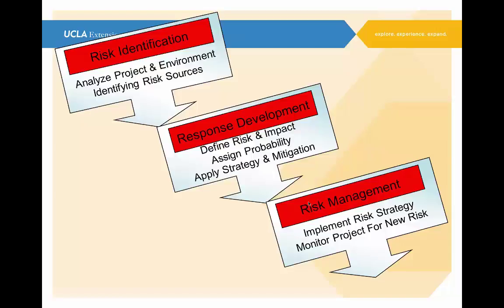Because sometimes the impact changes. The impact or the probability can change. It could go from 50-50 to maybe a 75% chance of occurrence. Also, often in a project, the risk goes away. Its time is done. The risk will not occur now in the future. Because if we were going to have that risk occur and create an impact to the project, it would have already happened. Therefore, we can take that off our monitoring. We can reduce our observation of that.